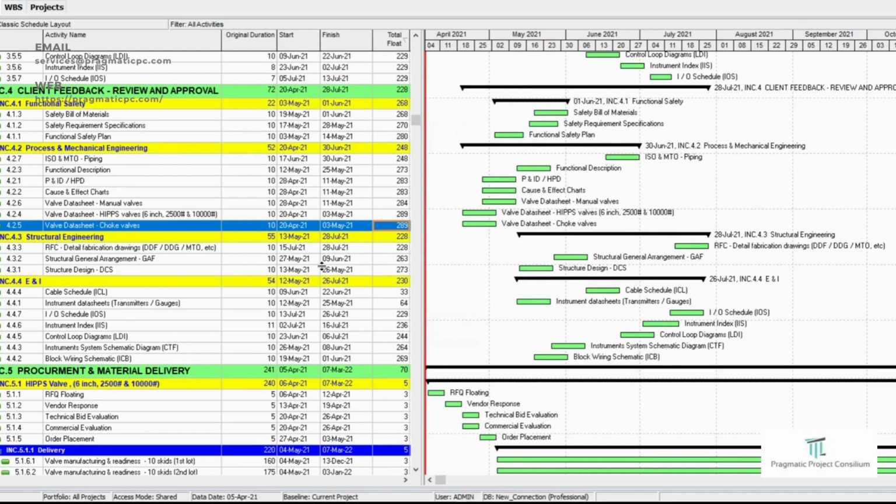As far as a properly built schedule is concerned, the activity must be properly linked. It is like a network of activities that are logically linked together. Now, the moment you see a large float for an activity, something has to be born in your mind: some logic or some predecessor, something is missing in the schedule.